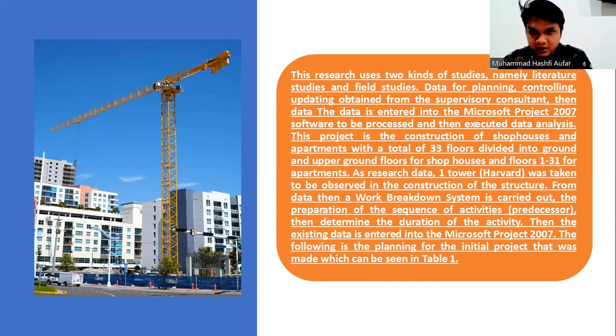The first tower, Harvard, is contracted to be involved in the construction of the structure. From the data, a work breakdown structure is carried out. Then the sequence of activities is prepared and the duration of the activities determined. Then the existing data is entered into Microsoft Project 2007.